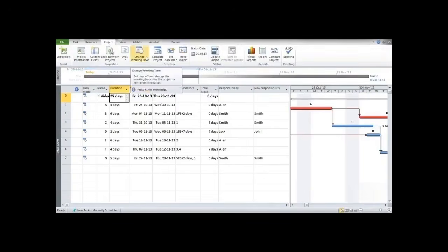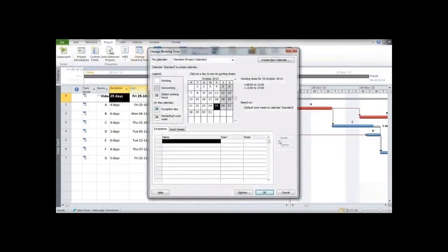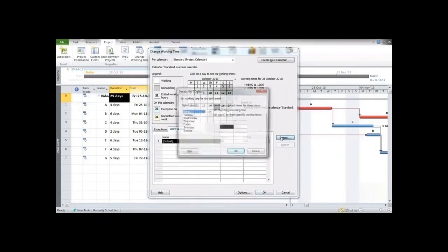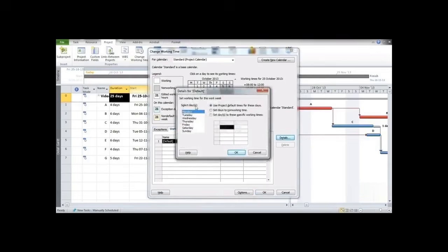Now we can click over here. So this is the general box that appears on our screen. The gray color over here indicates that it's a holiday, that is Saturday and Sunday by default are set as a holiday over here. So now if you want to modify and make it a working day, first of all we need to go over here on the Work Weeks tab, click on it. It's by default written over here. Go to Details and select days.